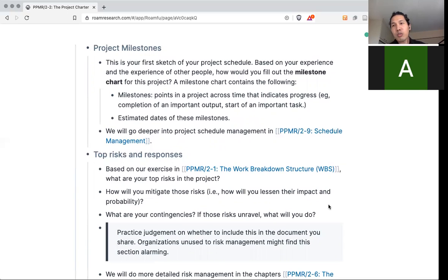So there you will also put the mitigation and the contingency. Mitigation: how do you lower the probability, and how do you lower the impact of that risk? It could mean you just order. Actually, you remove the risk if you order, or actually it could still be a risk. So if you order instead of cooking, you lessen that risk by selecting the right caterer, by really tasting each caterer's food, something like that.